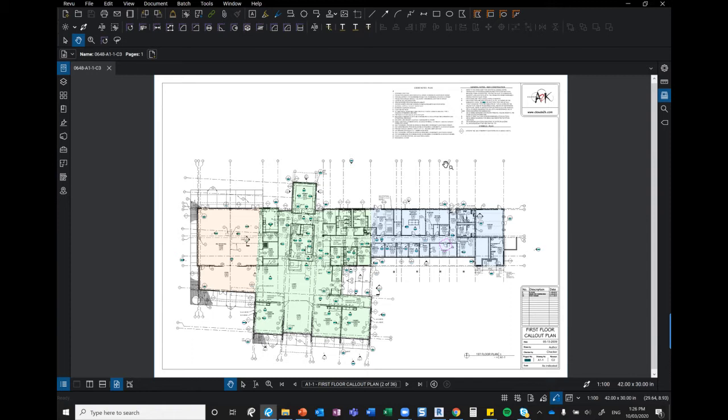They'll either coordinate or do the engineering or the architecture or whatever is required to take that to the next step for another peer review the following week, and then they can close this down over a 2-week period. So the idea is there's no longer doing paper markups or coordinating paper markups. It's all just live there and then.